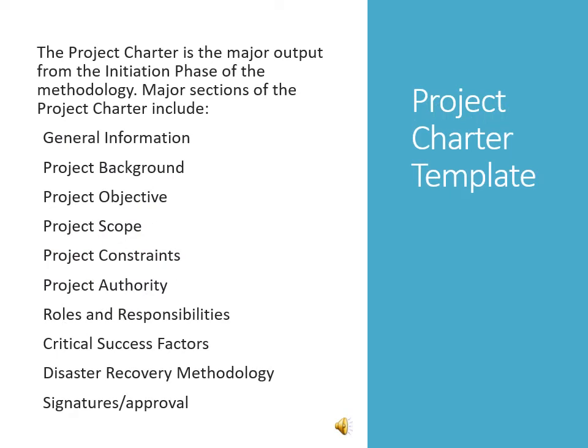The project charter template. In fact, the project charter is the major output from the initiation phase of the methodology. Major sections of the project charter include some general information, project background, project objective, project scope, project constraints, project authority, roles and responsibilities, critical success factors, disaster recovery methodology, and definitely any signatures and or approval.